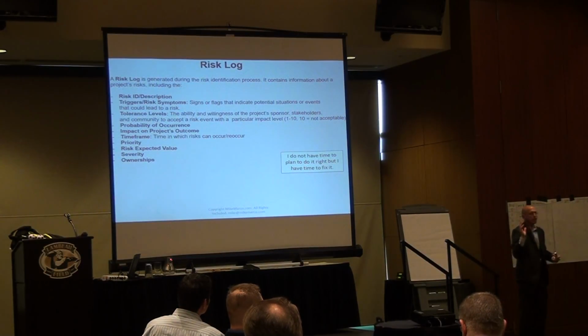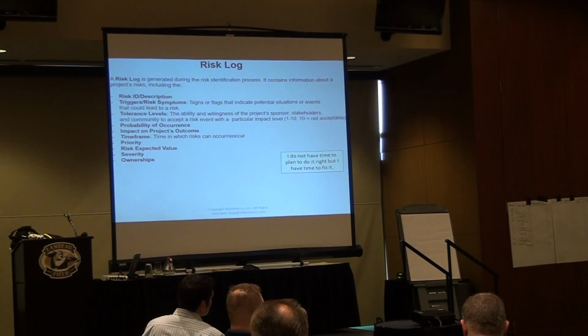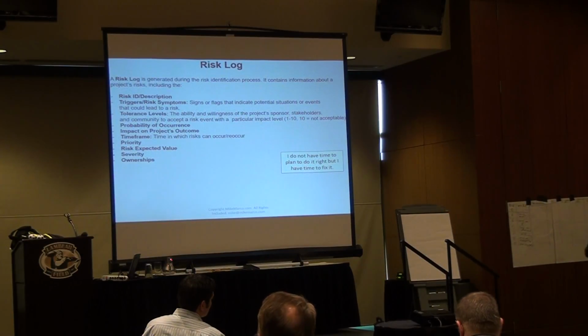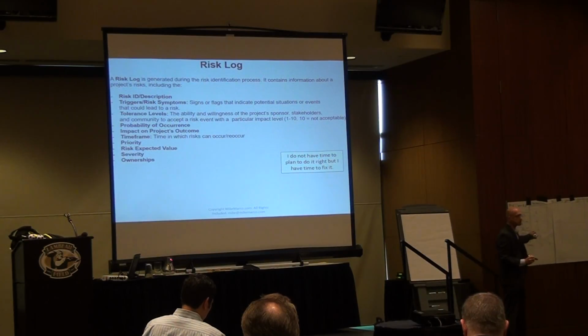Okay, so I will ask you to do that, and then I will ask you, what is the probability and impact? Where do I get probability and impact? I get probability and impact from my previous projects, historic records. So if I have 10 projects, and out of those 10 projects, 2 times I have a lack of expertise, what is the probability that this will happen again on a similar project? 2 out of 10, 20%, right? So let's put some probabilities here. Let's say 0.2, 0.4, 0.6, 0.8, 0.5. All of these are based on historic records. All of these are based on your stakeholder input. I never write these numbers by myself. I always ask team members. And I will tell you some of the tools that we can use.